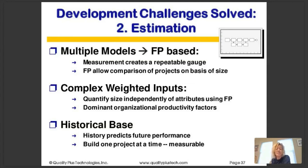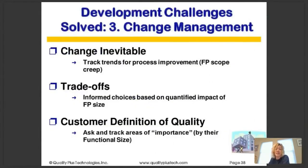Historical base is key — history predicts future performance better than theoretical models. We can build up a measurable historic base of projects by recording data one project at a time. For challenge number three, change management: we can track and transfer process improvement in terms of function point scope creep, and make informed choices based on the quantified impact of function point size.